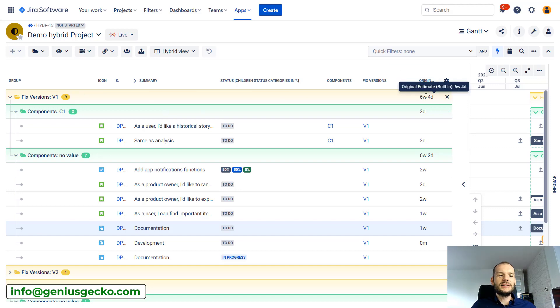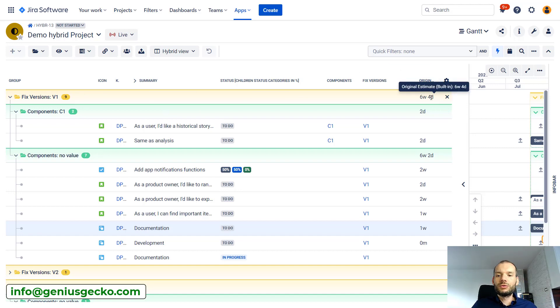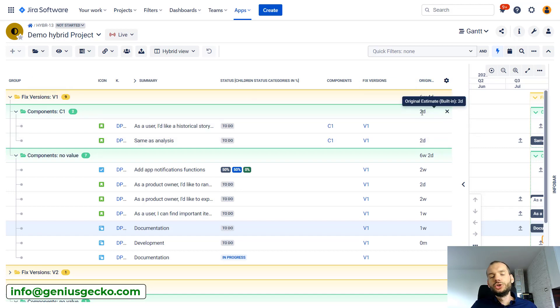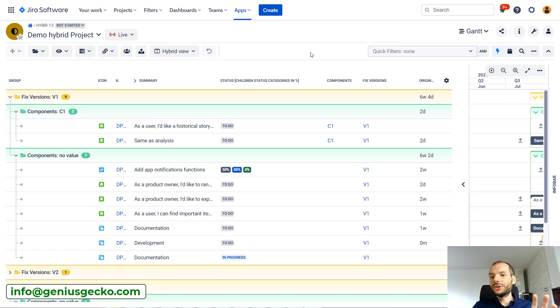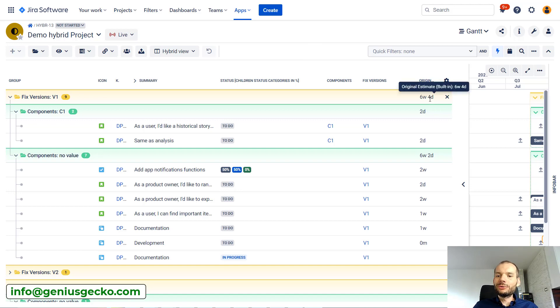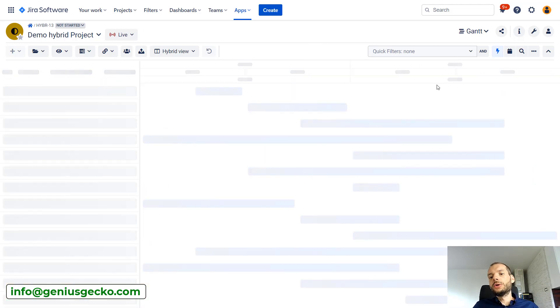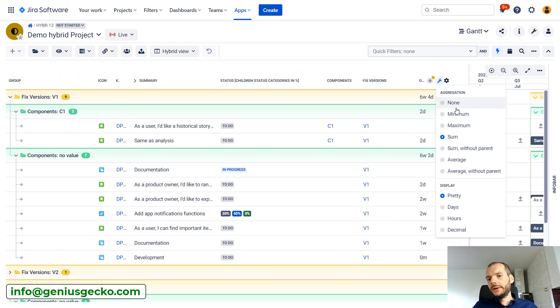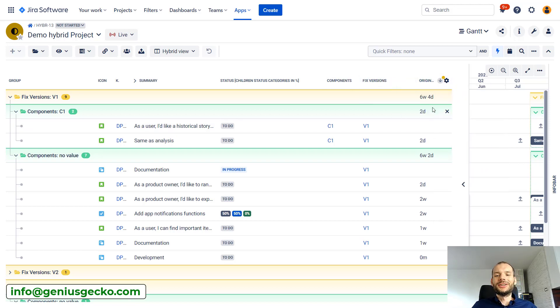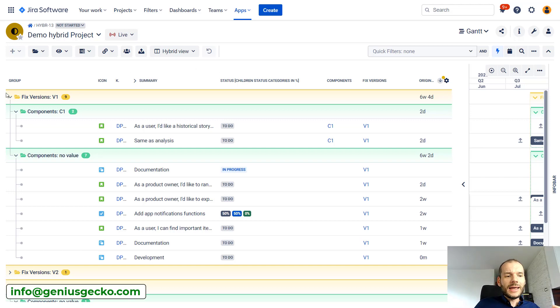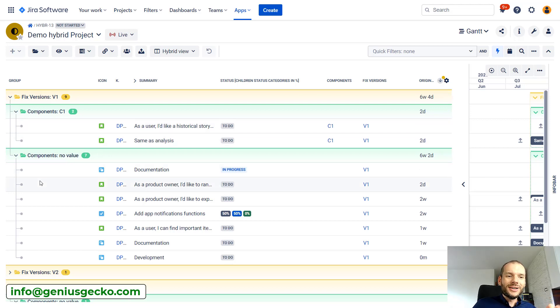Now we see that for version one, it's six weeks of work, a bit over, and inside version one for component one, just two days. Two important things to mention here: for Big Picture to show you aggregate of the values here, the column needs to have aggregation set. So if there will be no aggregation, obviously there will be no aggregation here too. That was the first important thing.